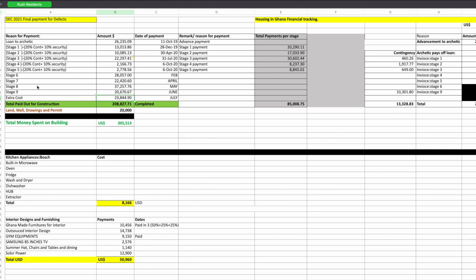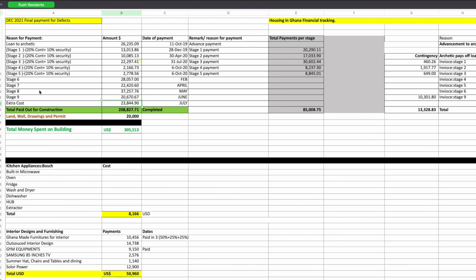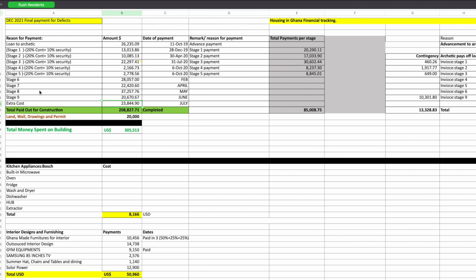This extra cost includes some lighting that I picked later on. The jacuzzi, I had a simple bathtub. I added more ACs to it. It went from 6 to 10. I picked some more expensive stuff, like the tile prices went up like crazy during COVID, because I was still bidding during COVID, and a lot of other stuff which came in as extra. That's why I was telling you guys earlier in the BOQ that it changed. So this extra cost does not reflect in the BOQ.